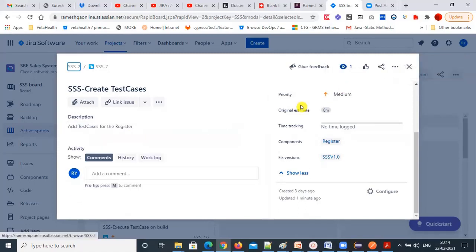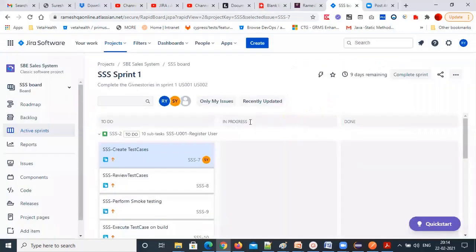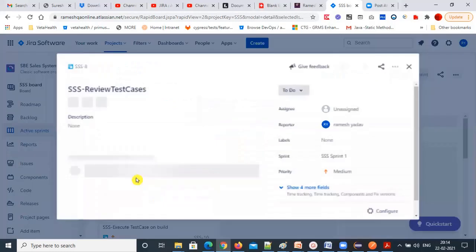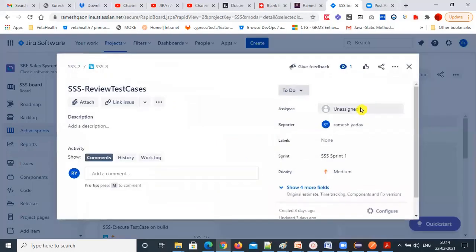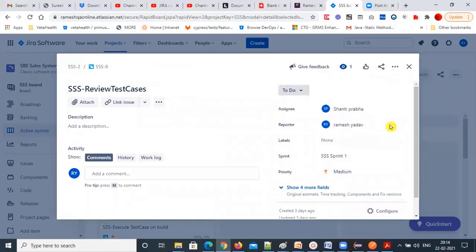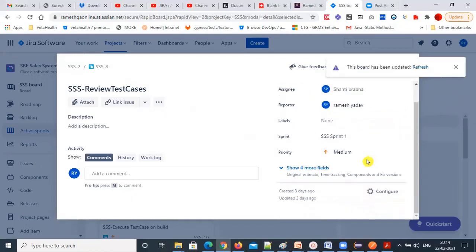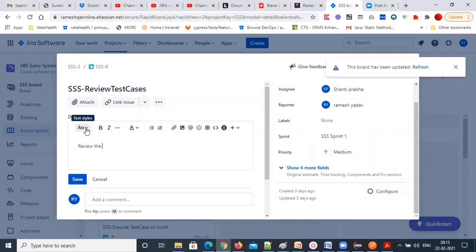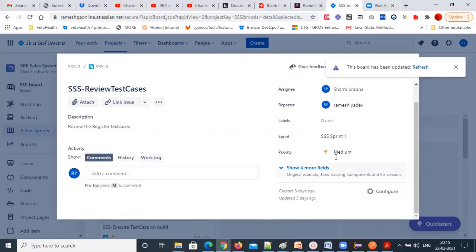The task is assigned to a particular person. For 'review the test cases,' I'll assign it to Shant — since Swarupa has written them, Shant will review. So I'm assigning 'review the register test cases' to Shant. Other fields are also there.